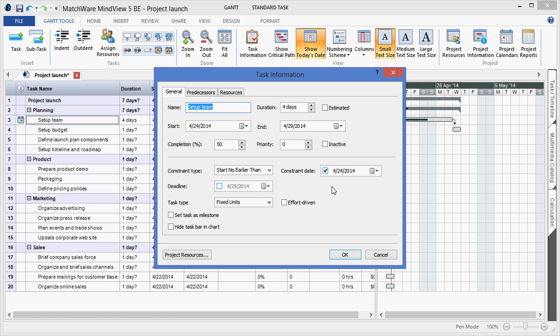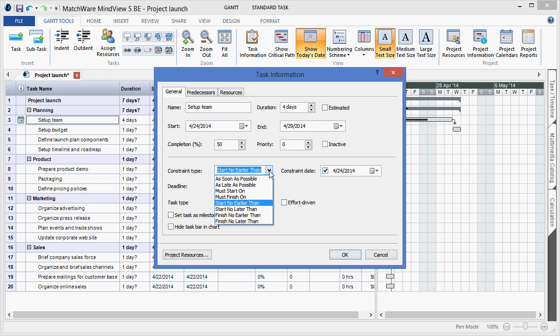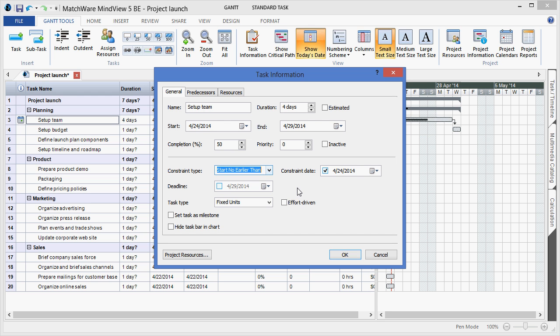I can also apply a constraint to a specific item, locking a task start date or end date in place. I can apply deadlines, or for more advanced users, I can determine effort-driven schedule and various task types.